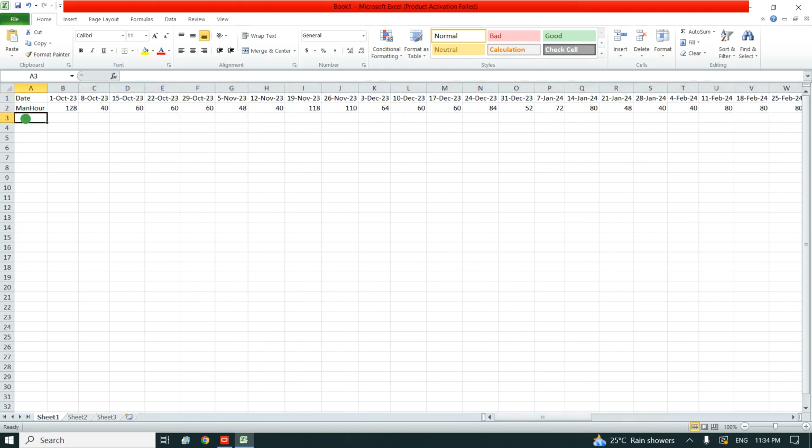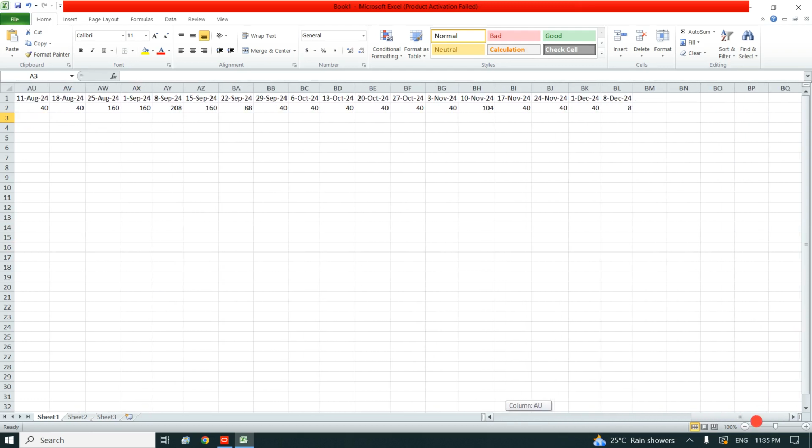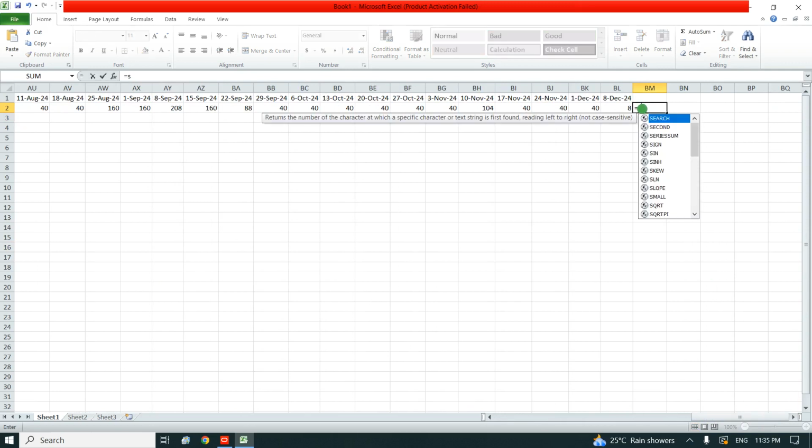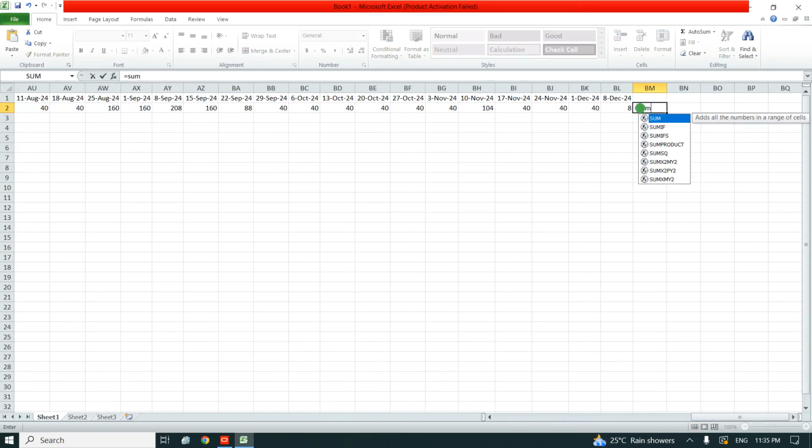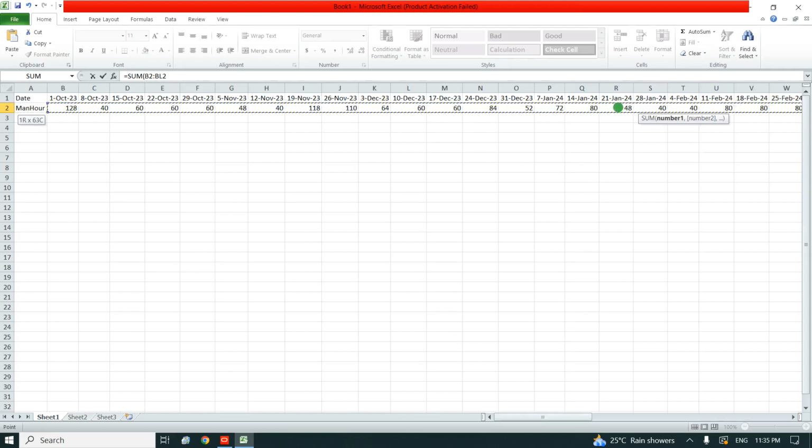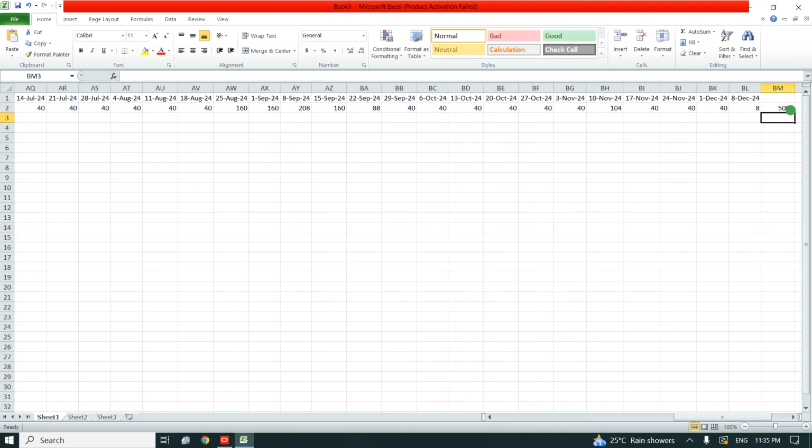Next step is to get the weight. Before I proceed with the weight, the first thing I need to do is to get the sum of my man hour. I will do it in form of sum. I will sum all the man hours. Okay, the total sum of my man hour is 5,000 man hours for this project.